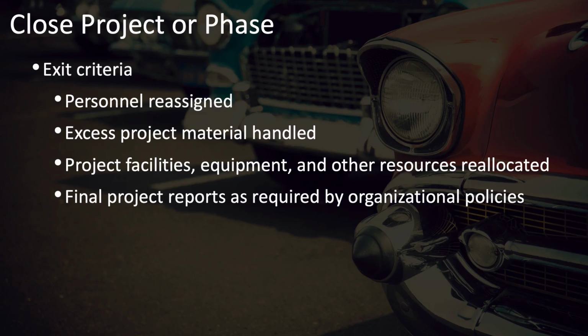And again, the same goes for a specific phase. If you only needed people for a certain phase, they should be reassigned at the end of the phase. That any excess materials at the end of the phase or other resources are reassigned at the end of the phase if not needed for other phases of the project. And if you do have some phase-specific reports, make sure that those are done before you call the phase complete and close it.